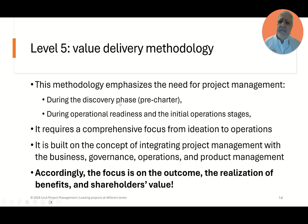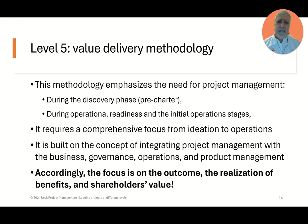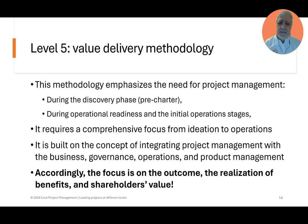In the value delivery methodology — level five — project management is heavily involved in the discovery phase, and they are also managing the operational readiness and initial operation stages. We're not necessarily the technical experts doing the technical work, but it needs to be managed in a coordinated way. Some people think this is program management — it is not. Unless all of these components are completed, the project will not deliver to its objective: I cannot operate the facility, I cannot operate the software, I cannot go to market. This is why it is an essential part of the project, even if it's often done by a separate team.